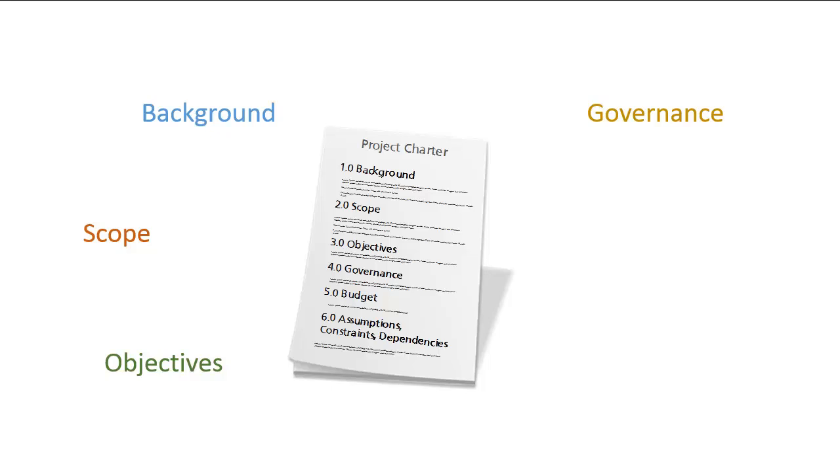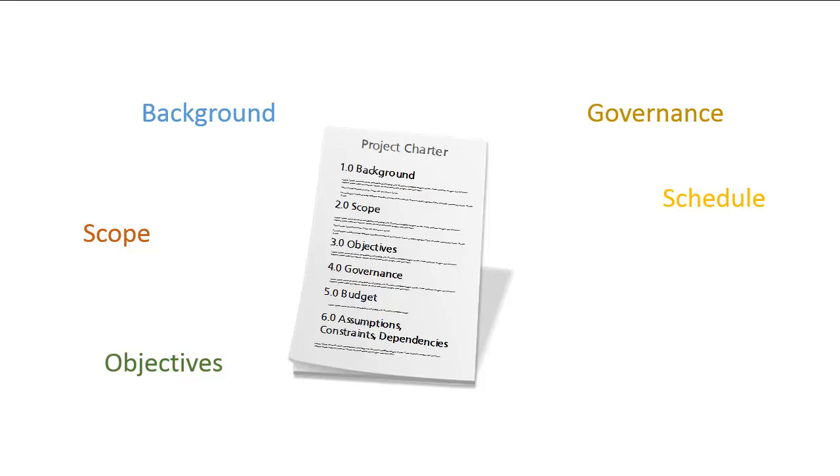The next section should list any key dates or milestones. It's important to point out that these dates are merely guesses or targets, if you will. You and your team haven't completed a detailed design of the project and haven't put together any comprehensive plans so you won't know what the actual dates are. But it's good to start off with a general understanding of the timeline the team is shooting for, as it may change or even dictate the team's approach to making it all happen.